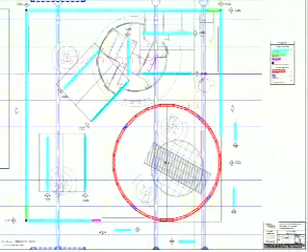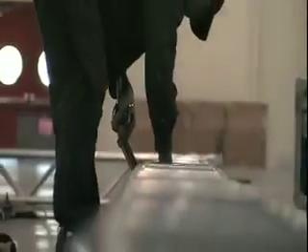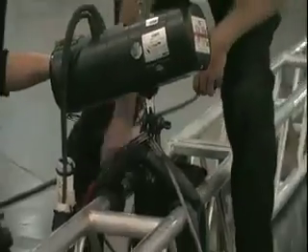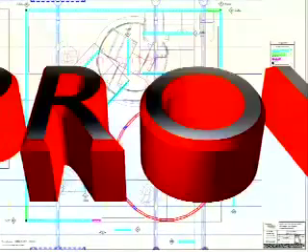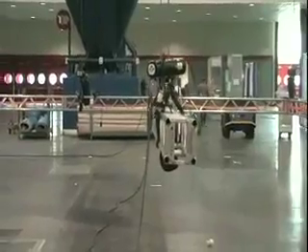On completion of some more complex designs, the truss plan is forwarded to a rigging expert who ensures that the plan is not only engineered correctly, but is engineered in the safest configuration possible. From time to time, this step may involve the use of a certified engineer to offer guidance and eventually a stamp of approval. Completing the truss plan early in the process not only helps eliminate potential rigging issues, but some show management or general contractors require that all truss plans be submitted to and approved by the head rigger of the show in advance of the installation.